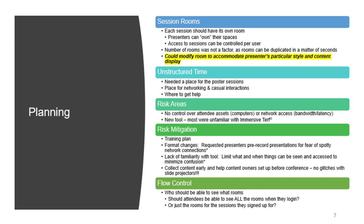This was difficult for some people, because once the video, which could be anywhere from 20 to 30 minutes, finished, people were not engaged enough to really take advantage of the highly interactive nature of the audio and seeing each other and being able to interact in a natural way with the presenters. So that was something that in our lessons learned in a big way, that we should have used it as a backup plan, not as a primary mode of presenting, which was fine. It's a lesson that we took away and gives us opportunity for improvement.